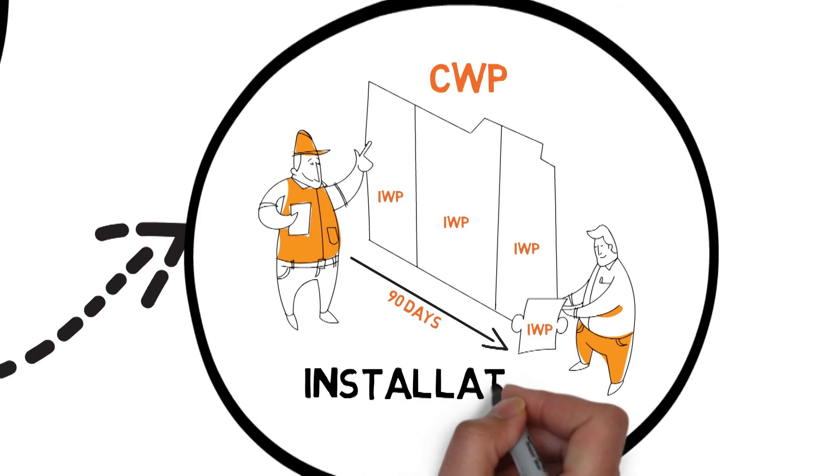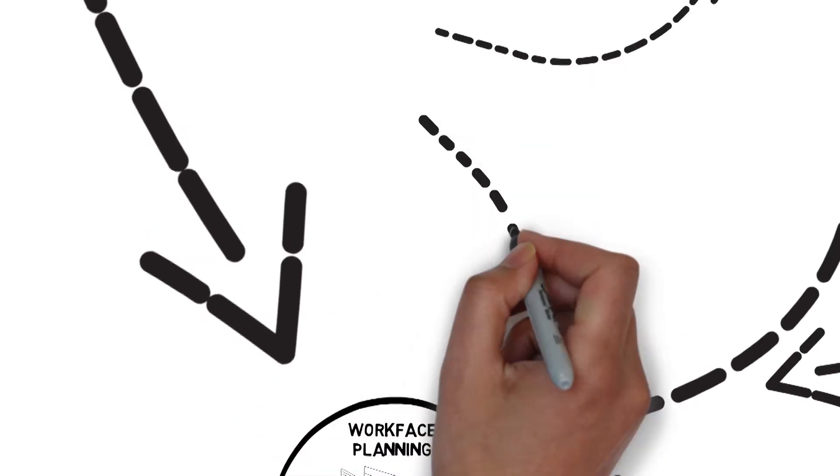The work face planner develops the packages and then works with the accountable parties to remove any constraints.